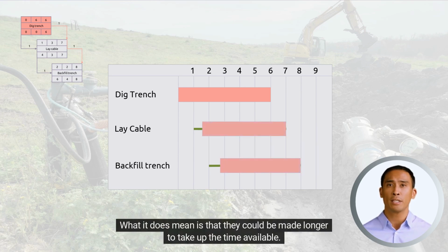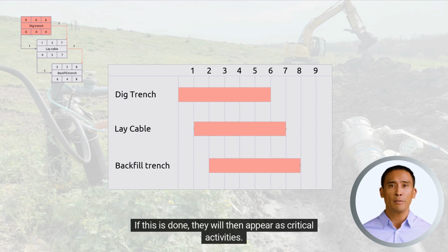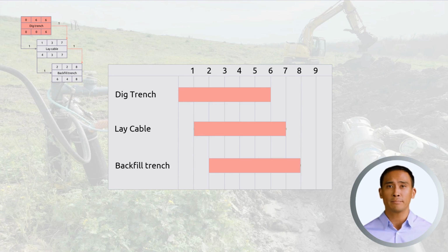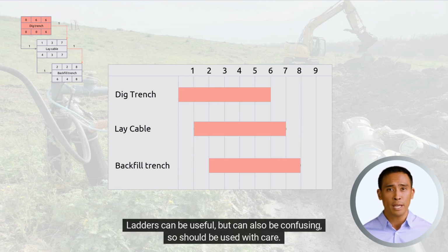What it does mean is that they could be made longer to take up the time available. If this is done, they will then appear as critical activities. Ladders can be useful, but can also be confusing, so should be used with care.